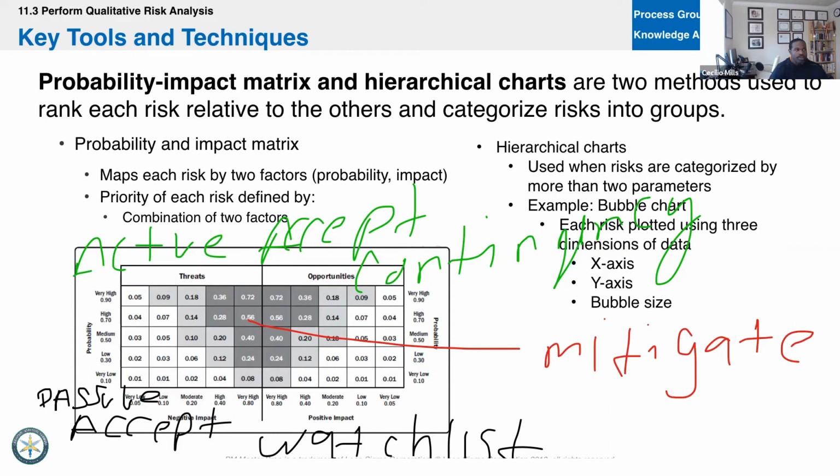when you're taking the exam, I want you to be careful for the language. I want you to watch out for the language. If they describe the fact that you and your team are actively doing something, you've changed some activities, it's not going to be about money. It's going to be about some actions. And you're doing that to minimize the impact or minimize the probability that this risk is going to happen, then that's mitigation. If you're simply putting away money, that's actively accepting.